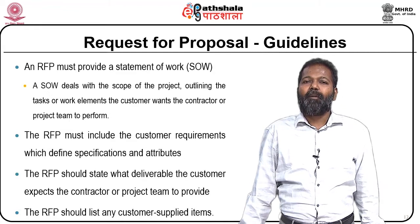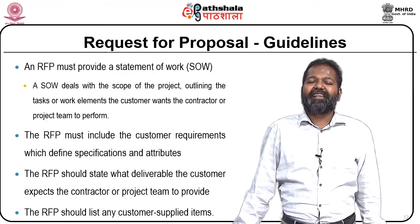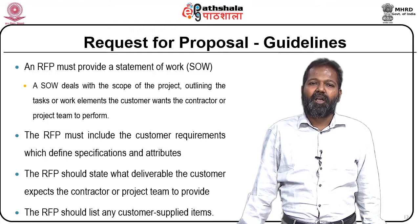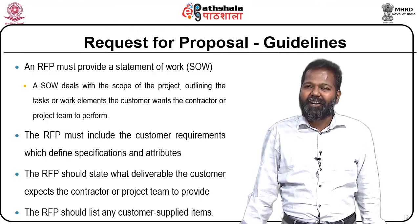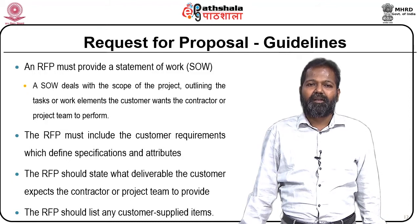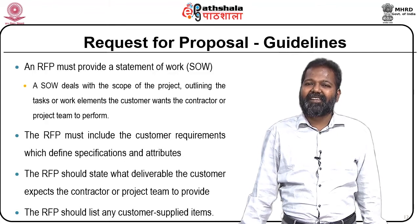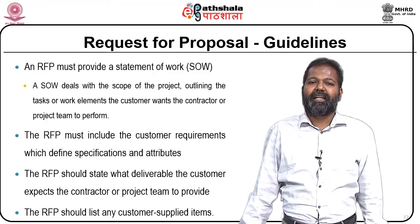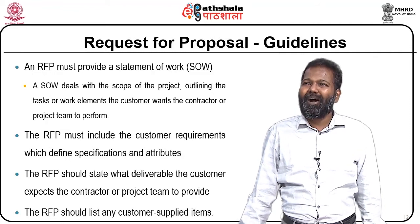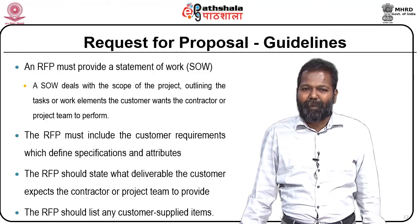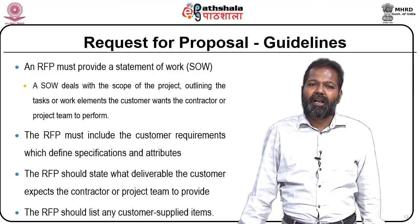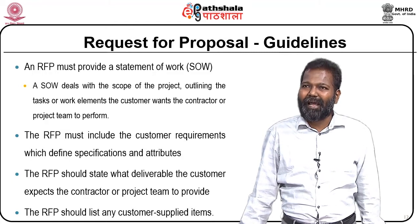A request for proposal must provide a statement of work, which deals with the scope of the project, outlining the tasks or work elements the customer wants the contractor or project team to perform. The request for proposal must include customer requirements which define specifications and attributes. It should state what deliverables the customer expects the contractor or project team to provide, and should list any customer-supplied items.